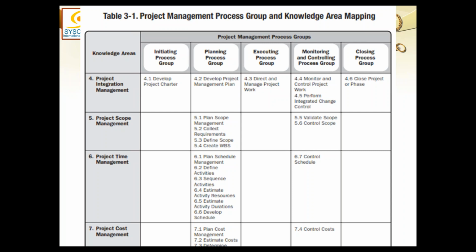Remaining all, there were 11 processes in monitoring and control. Only 2 processes are dealing with the deliverable. The remaining 9 processes, including the integration processes, are dealing with the work, the post-mortem of the process. And they all create change requests. And all the change requests are received by integrated change control, which is responsible for accepting or rejecting them.